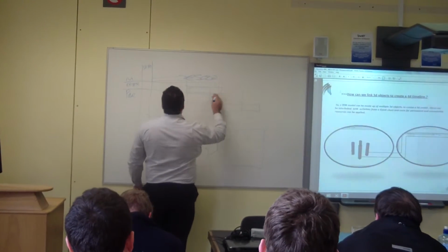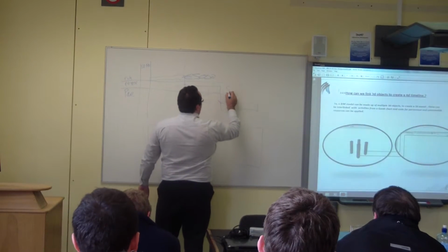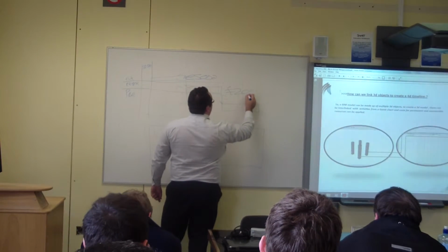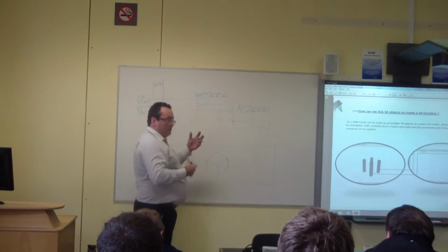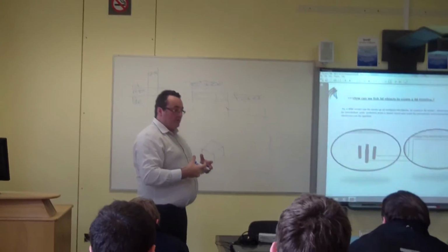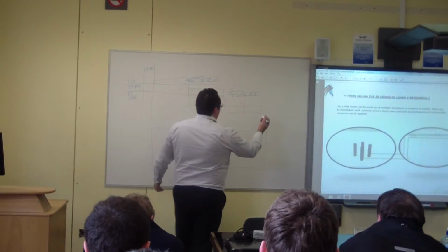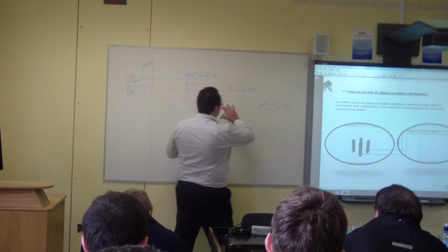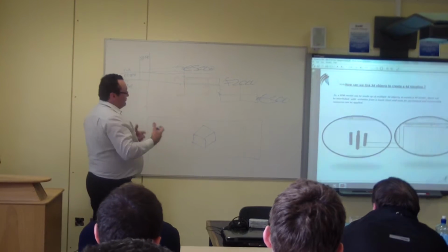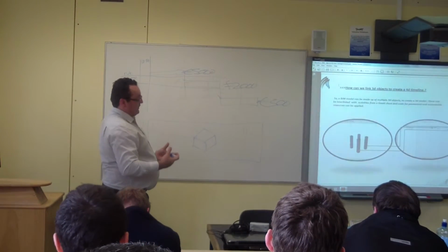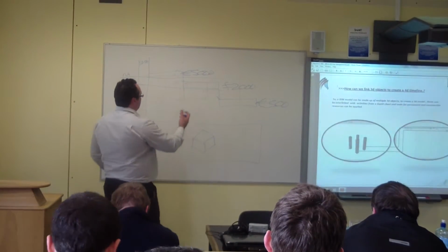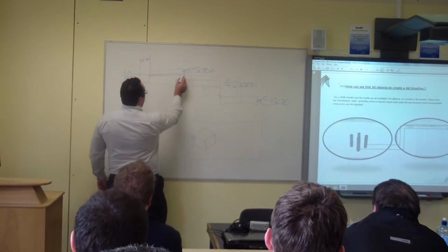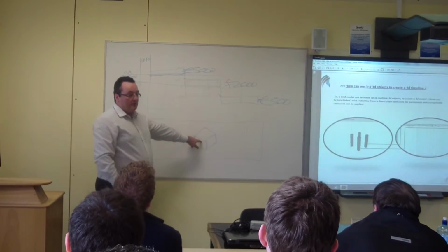So what you do as a contractor, you put in, say, £5,000 for formwork. You then look at rebar, say £2,000. And this is purely materials, machinery, and what it takes to build it. Pour concrete, say £500 or whatever. In Microsoft Project, or any type of scheduling system, you baseline it, and this is represented in the model as well in BIM.